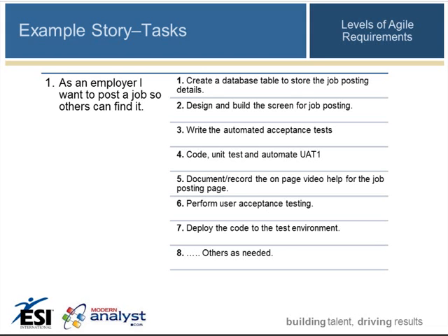And this is the stuff of the daily huddle, the daily stand-up meeting of an Agile project team to determine what needs to be done today or over the next several days as you move your way through these tasks. The tasks are not managed as project-level tasks in a conventional sense, but are self-managed by the team.